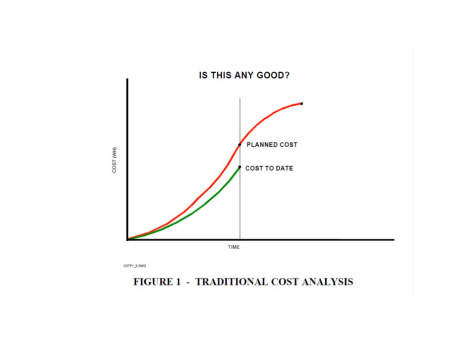And we've got a typical project curve here showing cost against time, and if we're looking at, is this any good? Is the project running as it should? So the progress of it. So we might say, looking at this, that's very good because the cost to date is less than the planned cost. So you might say that project is progressing very well, but that doesn't tell you the whole picture, because you might have spent less because you haven't completed as many jobs as you should have done.